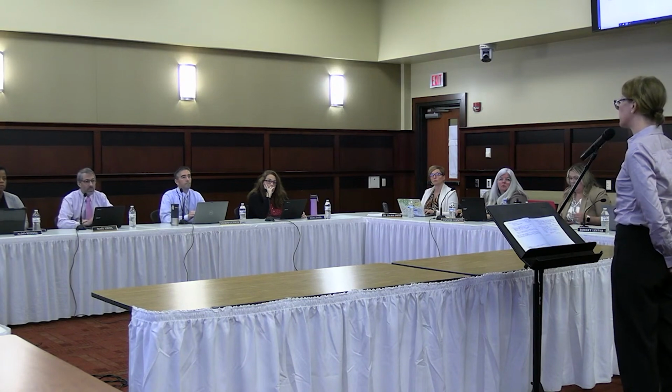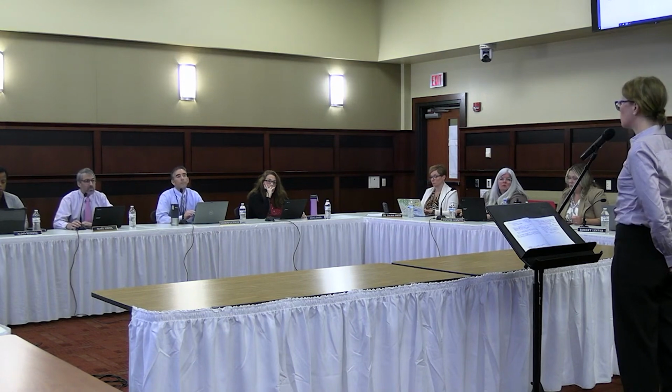The only question I have left is the timing. I understand the spring planting season, but is the timing of the drainage project relative to the school calendar likely to be before the end of the school year? We have considered this quite a bit, and there are a couple different ways to move forward. We can do it all at once, and if phasing seems to be the better solution, we can do the landscaping first and then wait for the school year to end to do the drainage portion of the project. That is something I think is better suited to walk through with our contractors once they're on board to make that final determination, but that is something we've been considering.